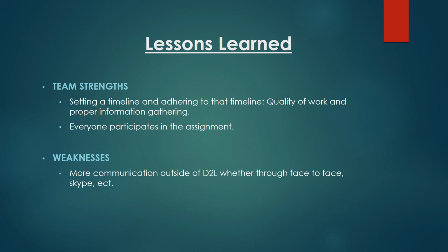Taking a look at the PIR project from a team perspective, we felt that our strengths revolved around the timeline that we submitted in the project proposal. We would submit our interview questions and send an email to the interviewee very early in the assignment, and this would allow us enough time to get the responses back from the interviewee and give us enough time to put some quality writing in before we went to the editing stage.